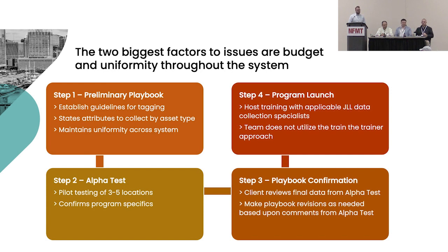So if we need to send architects and engineers to perform that collection versus if you're a fast food chain, complexity is a little bit less with fryers and ovens and grinders and things like that. So first, we scale it like that, but even when we do that, our costs are usually a little bit higher, I think, than our clients expect to spend on this. So they get the budget perspective and they say, oh, I didn't think this was going to be that pricey or that time consuming or that whatever it is.